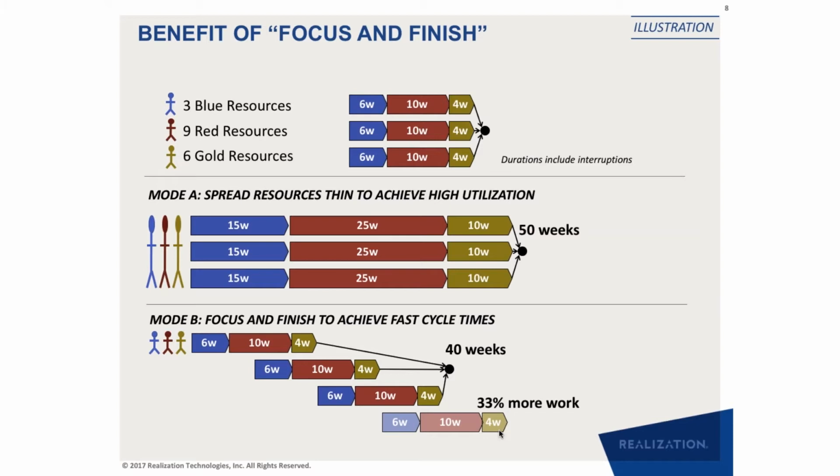So that is the purpose of the time buffer in a project: giving this scheduling flexibility of not doing the task exactly when you thought it should be done when you created the plan. That is the flexibility of scheduling. The meeting of commitments will still come from applying extra resources or extra money to do the project.